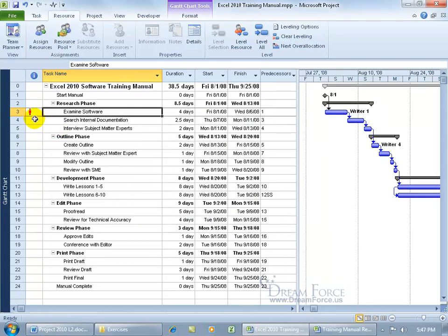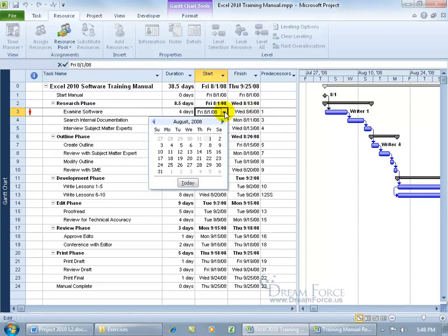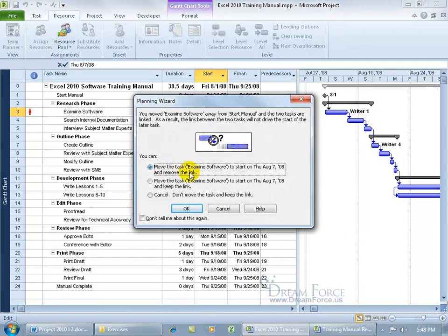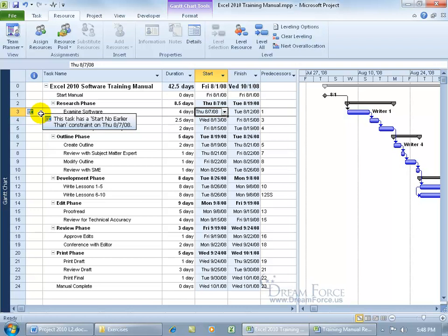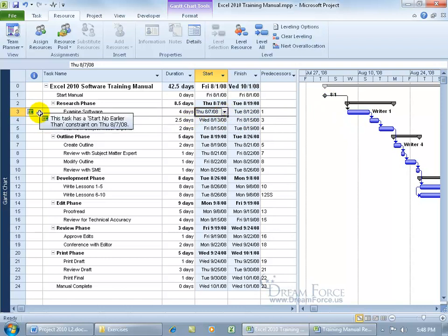Because of the link, Project flags Writer 1 with a red indicator to show the resource is over-allocated. To fix this, one option is to push out the start date — since we know the resource is used until the 6th, we start on the 7th. Project asks whether to break the predecessor link or keep it and push the task out. We'll keep it and push out. The link from the predecessor Milestone Start Manual is still there, and the red indicator is gone. But because we pushed it out, it adds a constraint saying this task can start no earlier than the 7th.